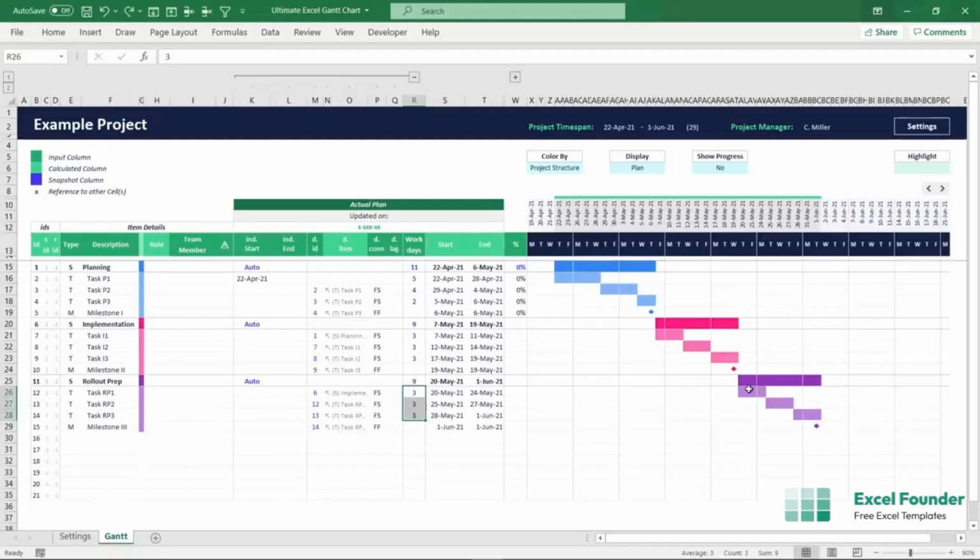In case you want to flip this into a backward scheduled stage dependency with the stage end date tied to the preceding stage, you can simply reverse the dependency logic by rearranging the linked IDs via drag and drop and updating the dependency connection types in the respective drop-down selections. And now, the more the number of workdays is increased, the earlier the stage has to start.